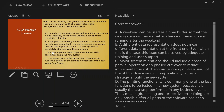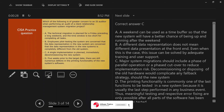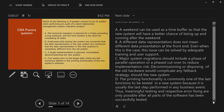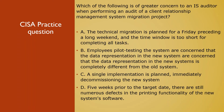Justification for each option: A weekend can be used as a time buffer so the new system has a better chance of being up and running. Different data representation at the front end can be solved by adequate training and support. Major system migrations should include a phase of parallel operation or phased cutover to reduce implementation risk — decommissioning old hardware would complicate any fallback plan, which is why C is the greatest concern. Printing functionality is typically one of the last functions tested and errors can only be fixed after all system software has been successfully tested.